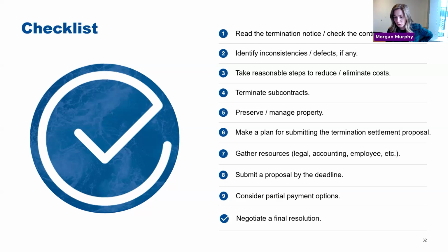So the limited termination costs available for commercial items is a reason to be wary of commercial contracts for products or services for which there is no commercial market and there are a lot of sunk costs, right? I think that's a fair statement. Yeah, Matthew, if you had no other place to sell, I don't think you'd be completely out of luck in recovering costs. But one of the things the government looks to in commercial terminations is it presumes it's a commercial item, so you have a commercial marketplace. You can go find somebody else to buy it. If that's not the case, yeah, it could be a lot harder.